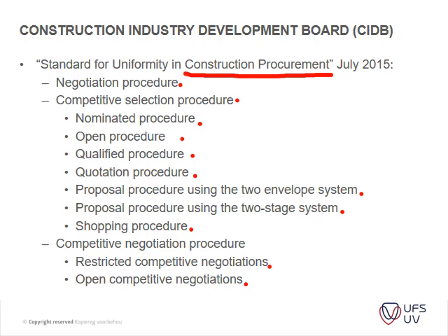Basically what it says is that you get the quotations in, and then you can start negotiating with the guys. For instance, I had one last week that closed 2 quotations, and the guy submitted the quotations, and then they said that they will give us a discount on their P's and G's if they're appointed for both contracts instead of just one. That type of negotiations. You guys understand that?